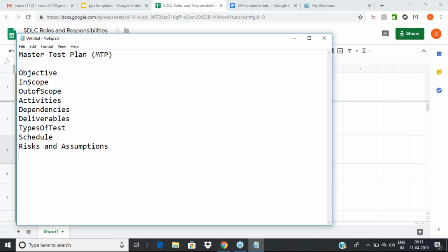We'll assume that the APIs or interfaces from all these third-party systems are going to be available by, let's say, 30th of April this month, and we are planning from there. But any delay from the third-party systems will delay our testing too. We are also expecting our test lab to be ready by 30th of April, but if there is any delay in getting the machines or the cloud access, it will also delay our testing. So there will be some assumptions.